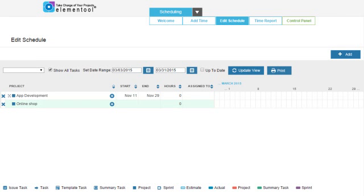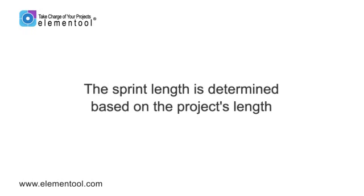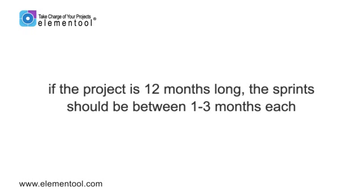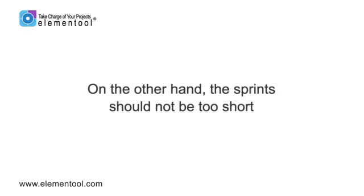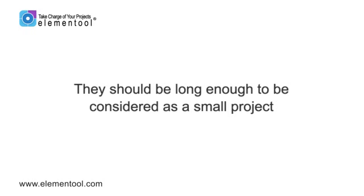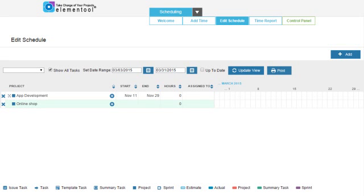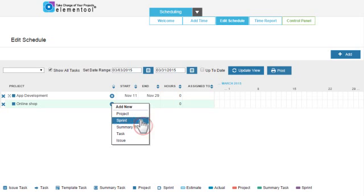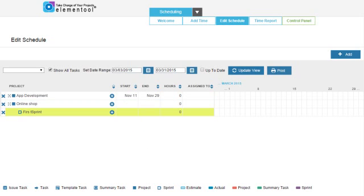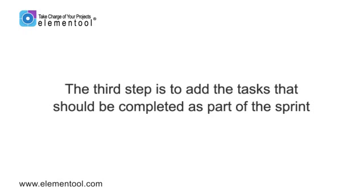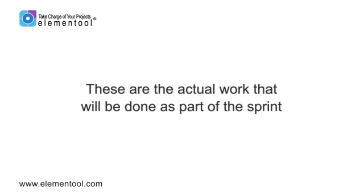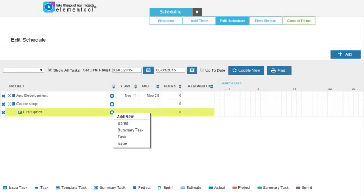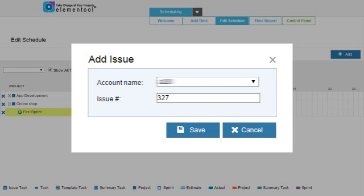Now that we have a project, the next step is to define the sprints. The sprint length is determined based on the project's length. For example, if the project is 12 months long, the sprints should be between 1 to 3 months each. On the other hand, the sprints should not be too short — they should be long enough to be considered a small project. Click on the plus button next to the project's name and choose the option Sprint. Type the sprint's name. The third step is to add the tasks that should be completed as part of the sprint. These are the actual work that will be done. Click on the plus button next to the sprint name and choose the option Issue to add an issue from the issue tracking account. Select the account name and type the issue number. When done, click Save.